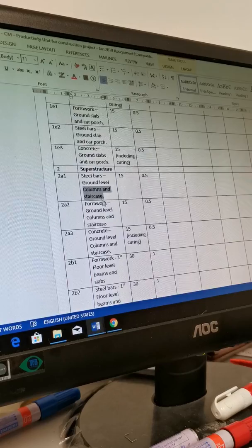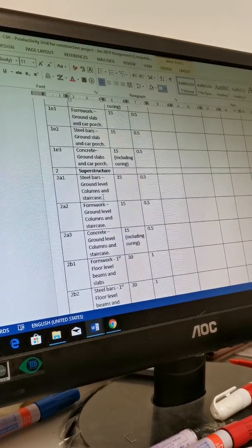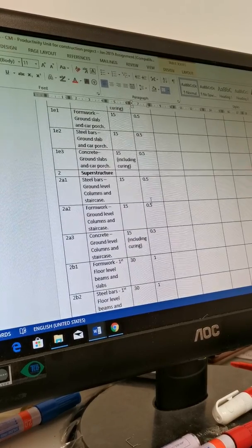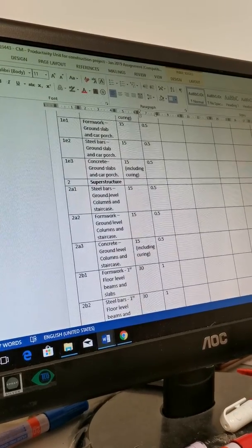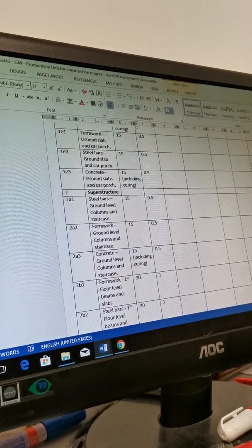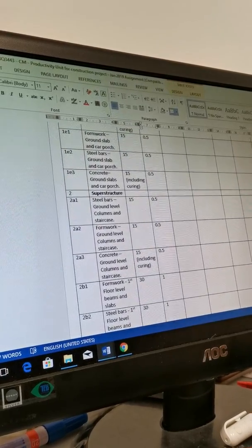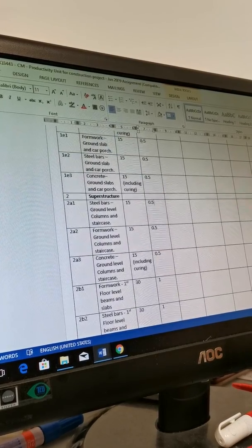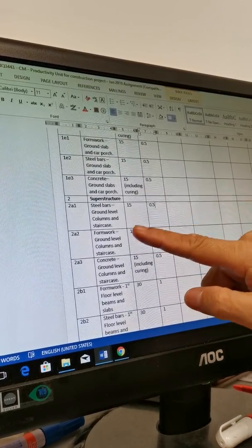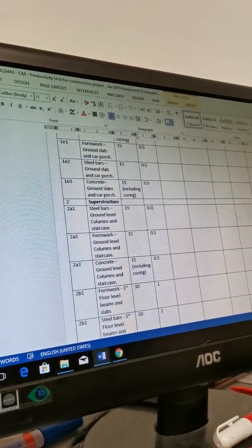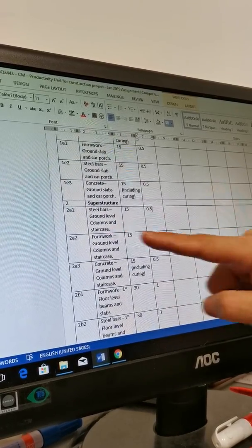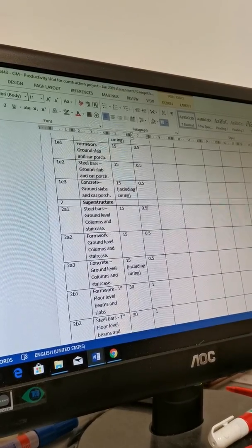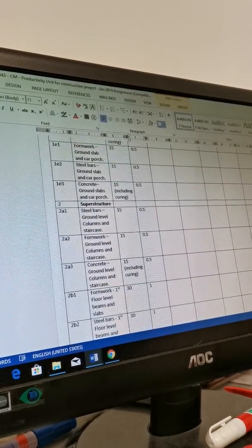You may want to have a staircase as a separate. It's up to you. But then maybe if you staircase separate, there maybe another so-called. It can be I put 0.5, but this one and this one concurrently. To draw that one is the same time, your duration, because it happened at the same time, half day. You must finish because another gang doing your staircase only. So if I combine this one, then here the people will be more only. If you put the staircase separate, that means here you got one group and then another group. But the duration is still 0.5 also. Half a day must finish it off. Something of that nature lah.